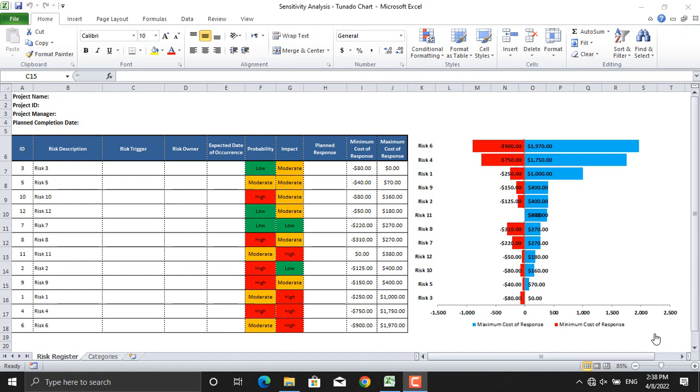One of the methods used in sensitivity analysis is tornado diagrams. A tornado diagram, also called a tornado chart, is a special type of bar chart where the data categories are listed vertically instead of the standard horizontal presentation. The categories are ordered so the largest bar appears at the top of the chart, the second largest appears second from the top, and so on. They are so named because the final chart appears to be one half of a tornado.